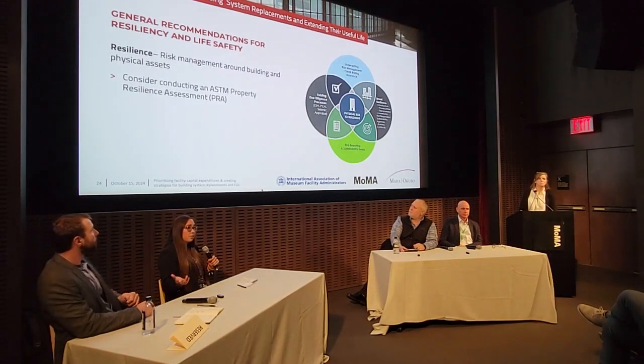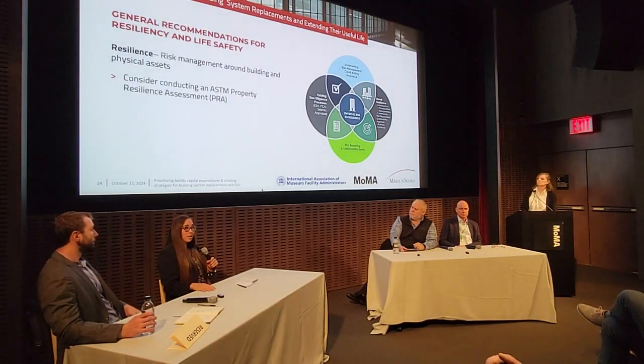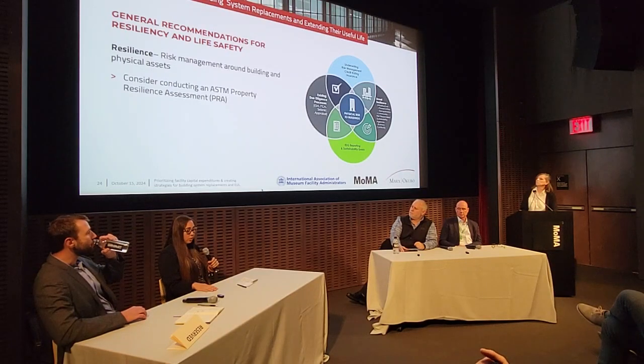There are 3 main steps of this guide. The first one is to identify which hazards will impact your property or museum. There are a lot of different tools out there. We use a particular hazard screening tool, which looks at existing historical data, current information, as well as projection models. With that information, we'll either go out to the site, as part of the condition assessment or separately, and look at all the systems, envelope, and site to identify vulnerabilities. The next step is to identify resilience measures to harden or adapt the property, especially for museums, the building itself, but also all the contents, and often there are storage facilities for all the different exhibits and art pieces. So having those be reviewed as part of it as well is really critical.